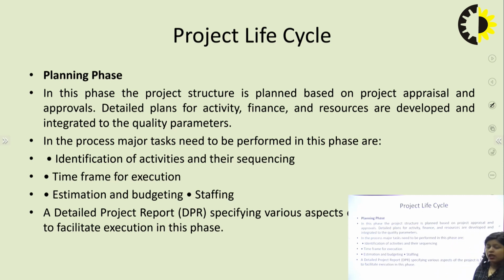Now after finding out all these activities, their sequencing, their time frame, and the budget involved, all these are put into a detailed report which is known as the detailed project report, the DPR. The DPR specifies various aspects of the project to facilitate execution.